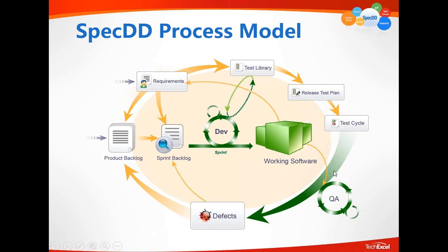And the end result of the testing cycle, which does not necessarily need to be synchronized with the development iterations, is that such testing effort contributes the fact that now you have found a set of defects. And the defects get populated into the product backlog, and occasionally, for those crazy teams, the QA team assigns them directly into a sprint backlog.